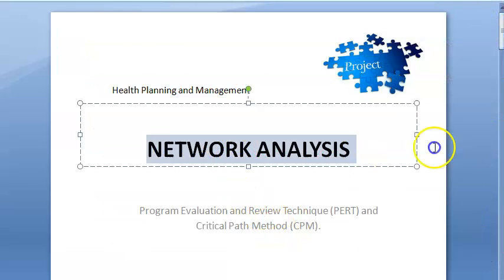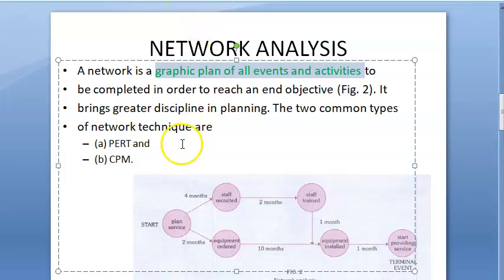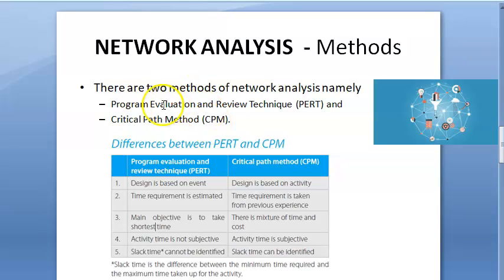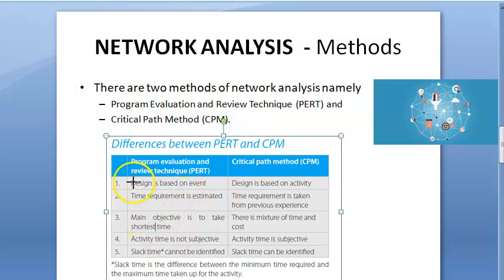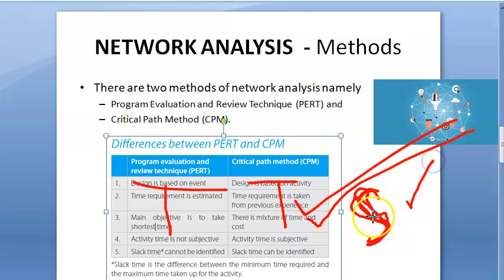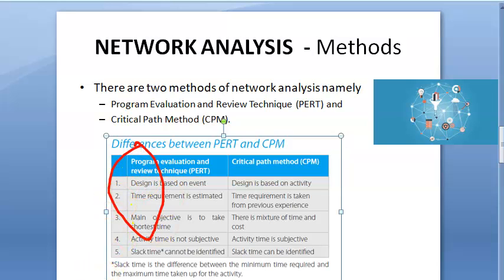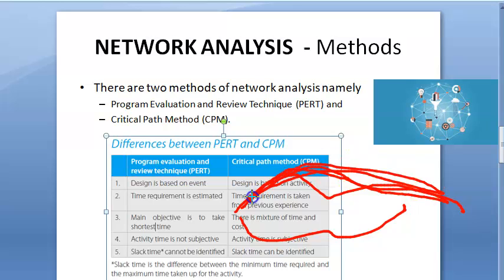To summarize: network analysis comes under project management. There are two types — PERT and CPM. A network is a graphic plan of all events and activities to be completed in order to reach your end objective. In PERT, the time required is estimated; in CPM, the time is known from previous experience, so you can identify the slack time. In CPM, you draw the network and find out which path takes the longest time — that critical path receives more attention.